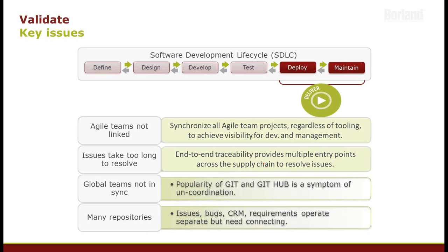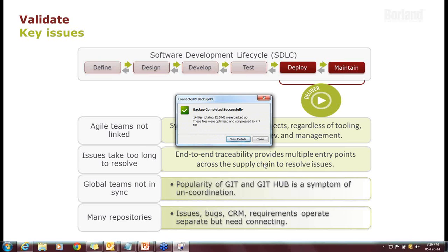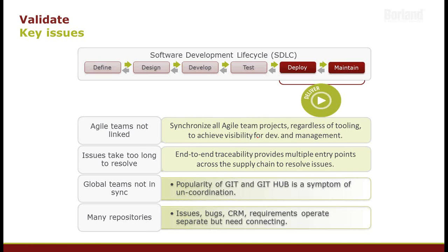Okay, let me give an example here. If a particular requirement is given by the customer, and that requirement is not taken care of, as I said, a defect is born. Let's say this defect comes to notice during UAT and goes to the tester. The tester then points a finger at the developer. The developer says whatever requirement was given, it was coded based on that. The tester also says, whatever code was there, I created the test case based on that, and it failed. So you do not know where the culprit is sitting. Hence, it's very important to have end-to-end traceability.